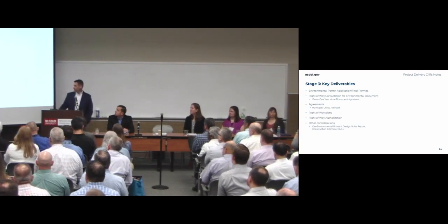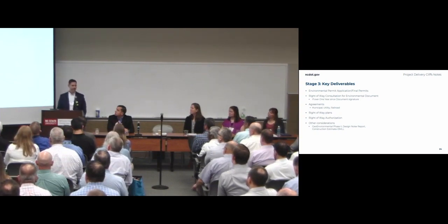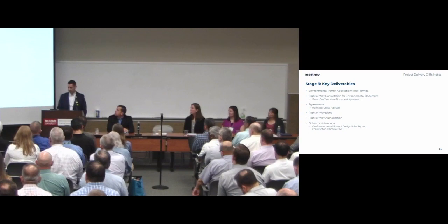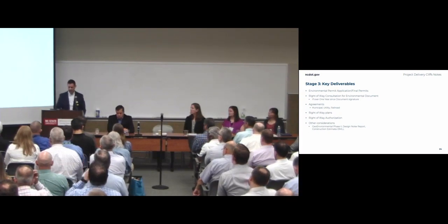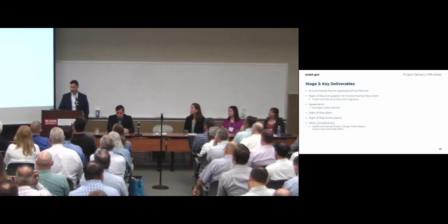And I've noted here the construction estimate, the 13-month let list is going to be called a lot of things, but essentially you need that construction estimate updated before it goes on the 12-month let list. So be thinking about that. That may play into your schedule, just depending on how your milestones are playing out for your particular project. But keep an eye on that so you don't get caught at the end trying to update quantities.